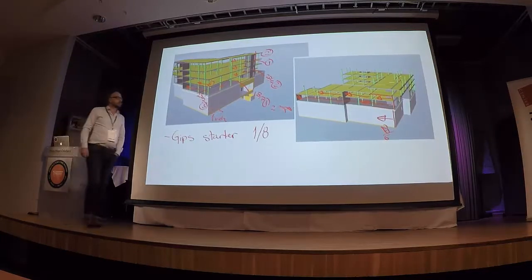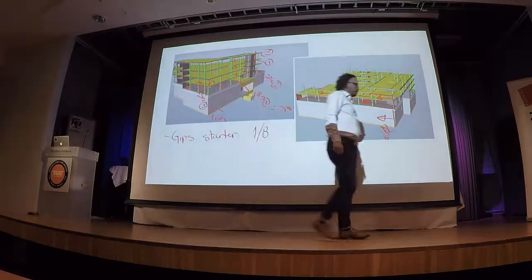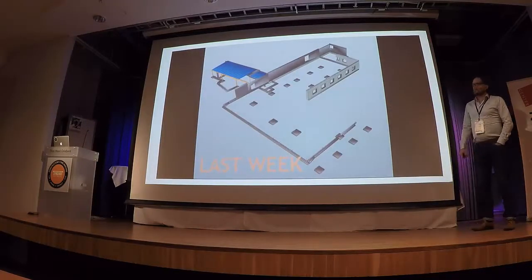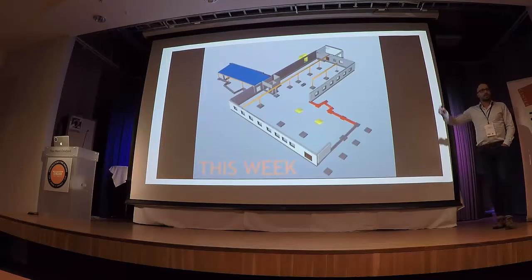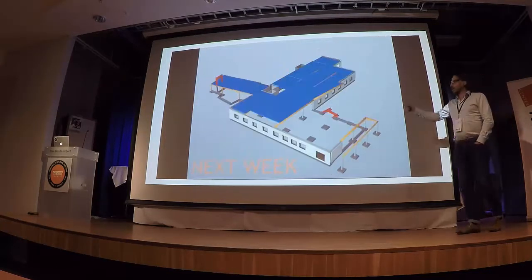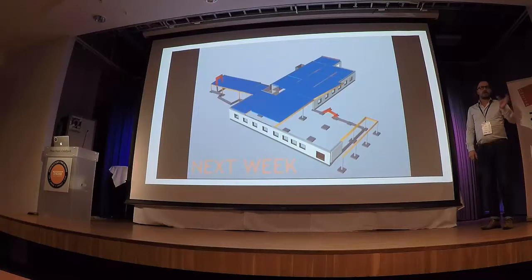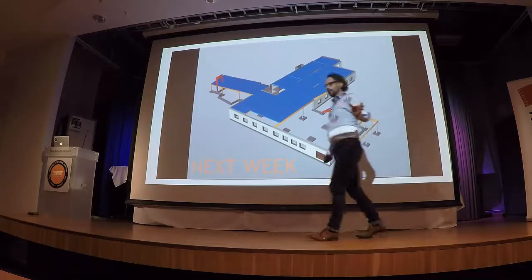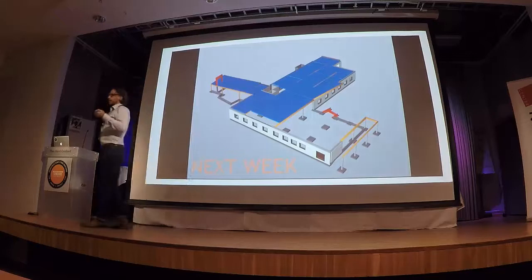I think there's one more, showing the lowest hanging fruit. This is from our weekly meeting with the superintendent, showing a picture of last week, planned activities this week and next week. Very, very easy animations or pictures, but it has given a lot of value. So you don't need a $46 billion project to use this. Start using it in any project with any schedule that you have.